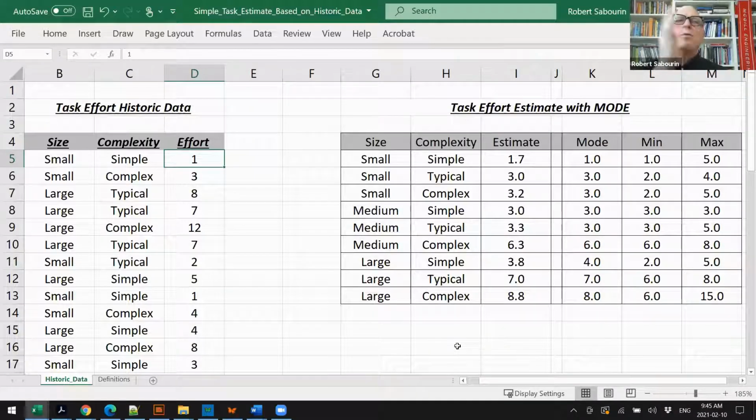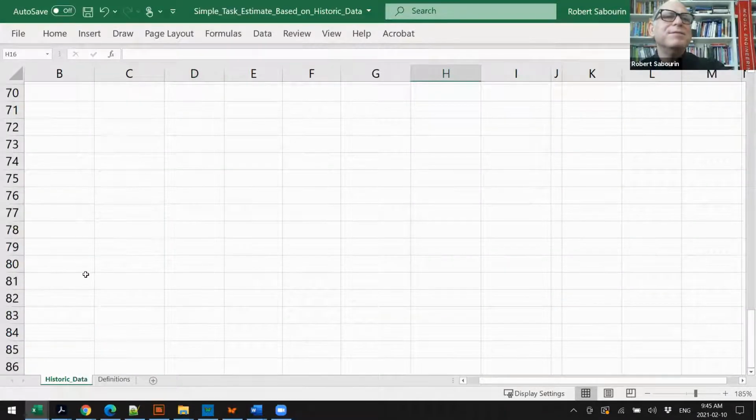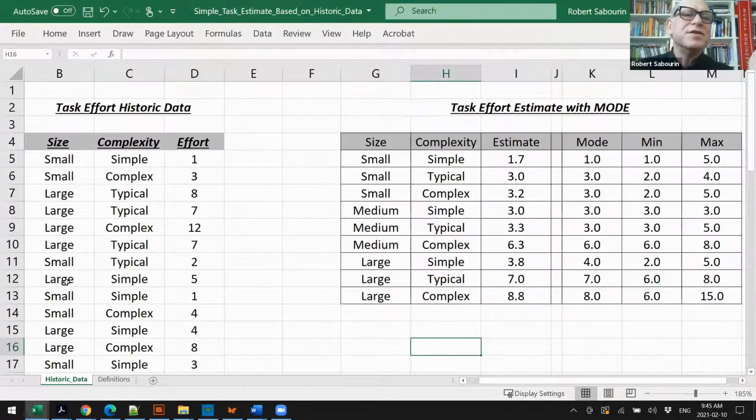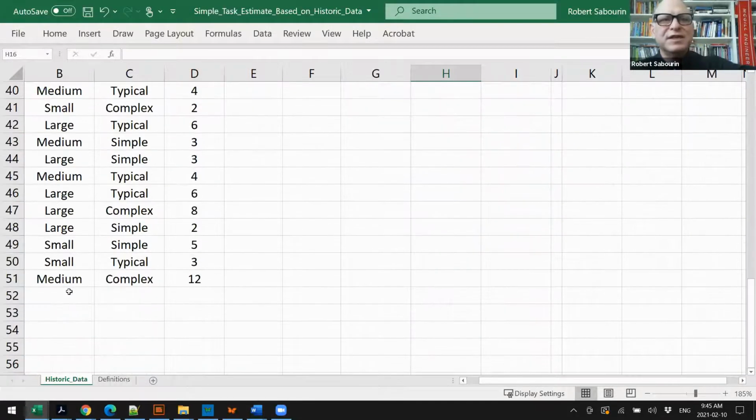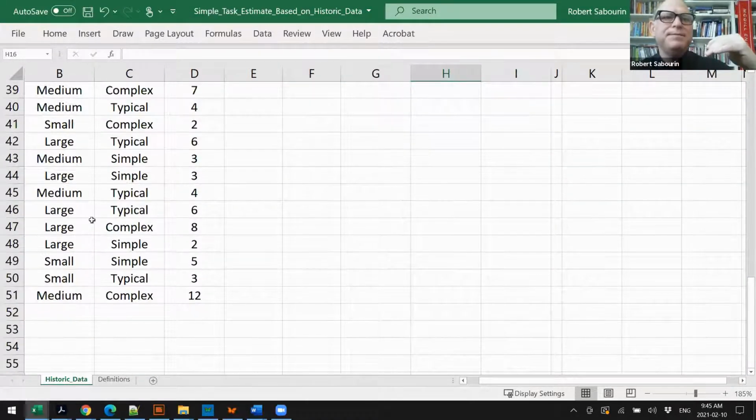That's a session. What I'm capturing is how many test sessions it took to do this charter, and that's what we capture at the end. It's easier than saying how many minutes or hours. For me, sessions are the beautiful unit to use for this, but use whatever unit your company wants. Again, it doesn't change the method. In this example there are about 50 or 60 rows collected. This could grow to several hundred very quickly.